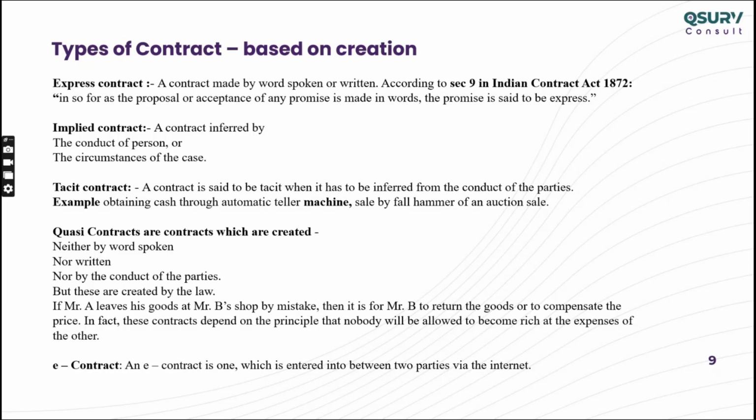For example, in your construction project, there is a variation and he submitted it and you didn't approve it, he starts the work, and at the end you're telling him, I haven't approved the work, I'm not going to pay you. If you go to the court, you will be in trouble. The court will not let you get the benefit because it is unjust enrichment. There's no justice for the contractor. The court will tell you, dear client, you got a benefit, now it is your turn to give justice to the contractor, pay him the money.